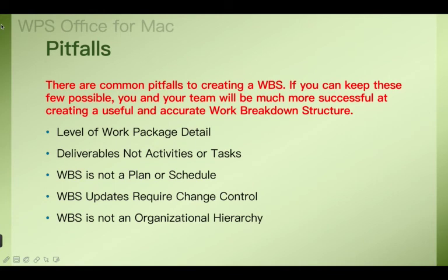Pitfalls. There are common pitfalls to creating a WBS. If you can keep these to a minimum, you and your team will be much more successful at creating a useful and accurate work breakdown structure. Level of work package detail. Deliverables, not activities or tasks. WBS is not a plan or schedule. WBS updates require change control. WBS is not an organizational hierarchy.